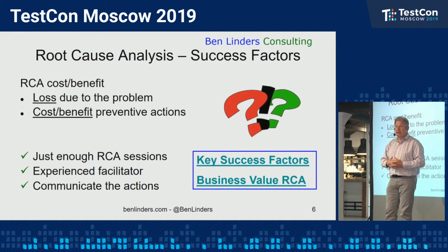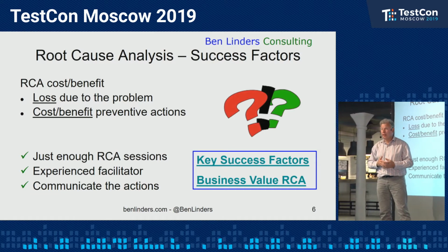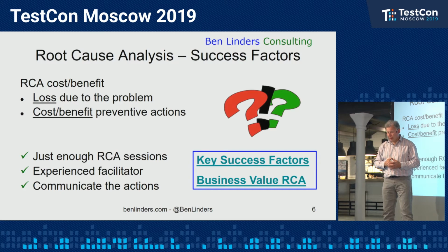You know what your revenue would be in your organization, so you know how much money that would cost. If people can't do their work, you can look at things like salaries. Okay, how much money did it cost us when people cannot do their work for an hour? So looking at the loss that you had is a first indication whether it's important enough to investigate this problem.